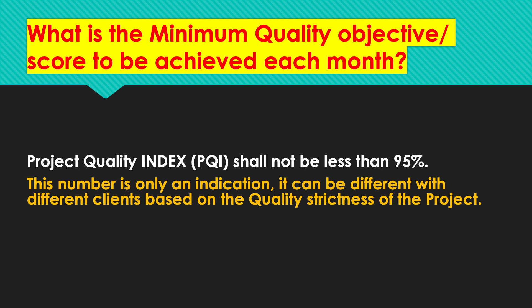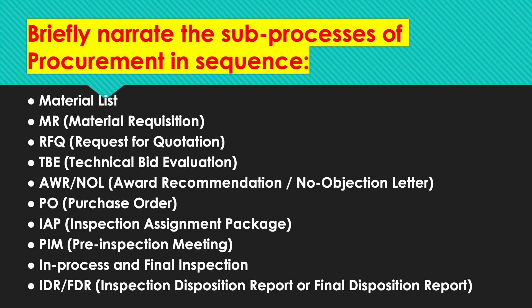Briefly narrate the sub-processes of procurement in sequence. The basic key sub-processes are: a material list is prepared, then a material requisition (MR) is prepared, then a request for quotation (RFQ) is sent to at least three vendors or manufacturers, then we take the lowest bid, followed by technical bid evaluation (TBE). After TBE, the order is awarded to the chosen vendor (AWR). We then need to achieve the NOL — No Objection Letter — from the client, then issue a purchase order.